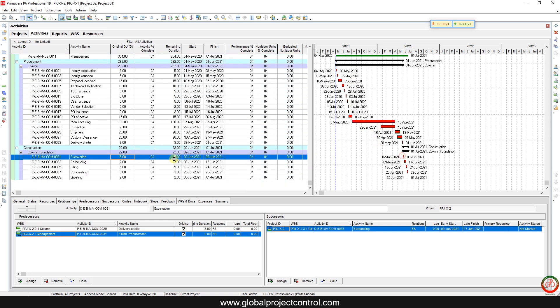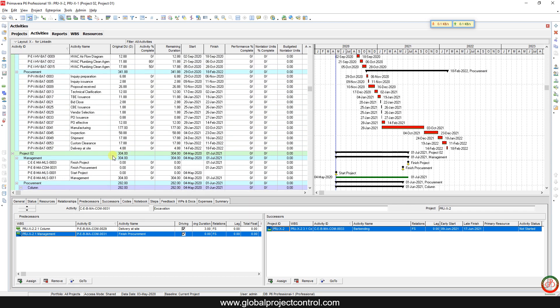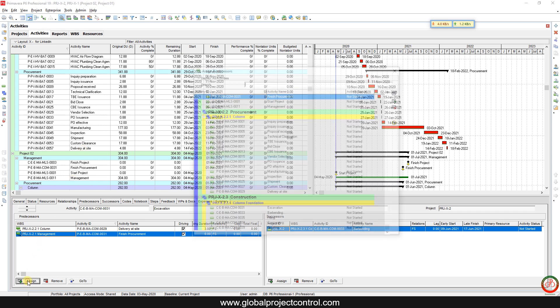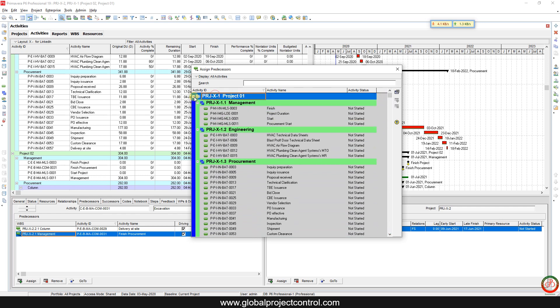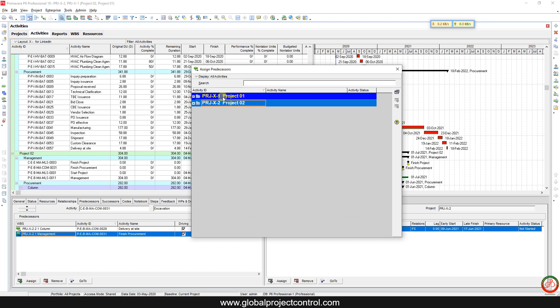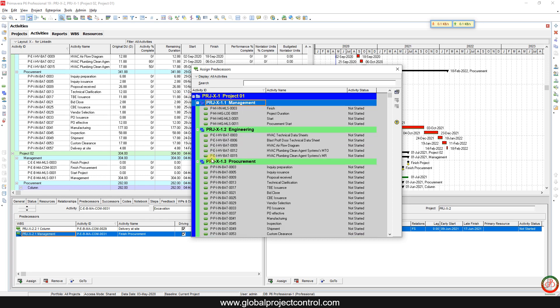The excavation activity in Project First is going to be connected to the prime human delivery at site. When you open two projects, you should look at the list of projects in the assigned predecessor. Be careful — if you want to create an external link between two projects, you should be careful about which project you are working on.